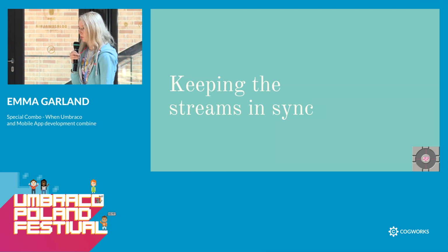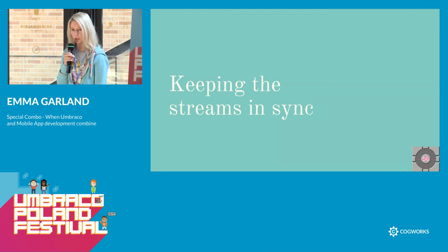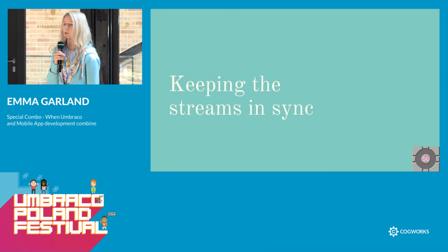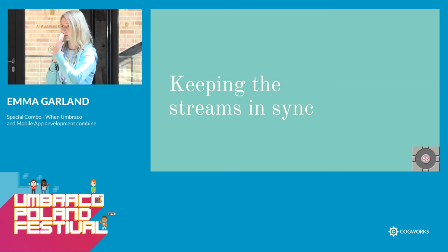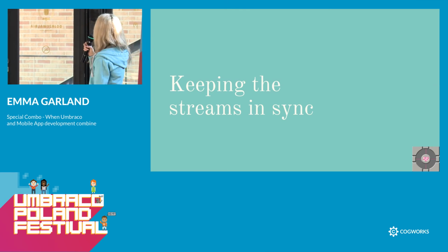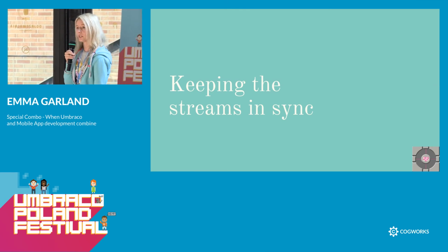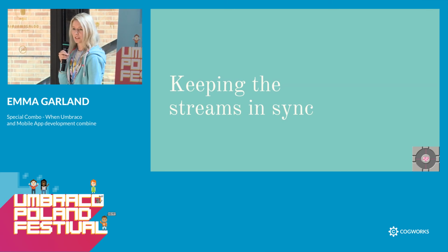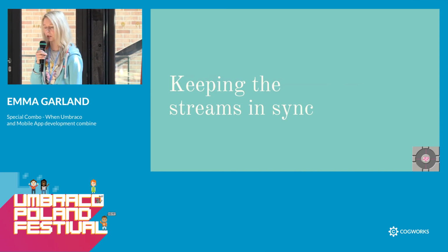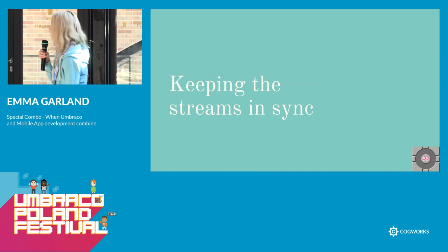We worked in a Scrum approach. Next time, I think we would all be on the same team, all the same Scrum build in terms of features. So, like the events review feature that came in this year, we would probably say, okay, it's a vertical slice through everything we need to do to get this feature out. So Chris would be on the same Scrum. It just would save time. So that was a learning from this project. And then testing. It really helped, and it was a genuine experience to see how important these full suites of tests were for Chris and ourselves.